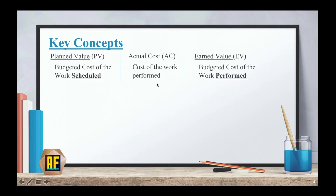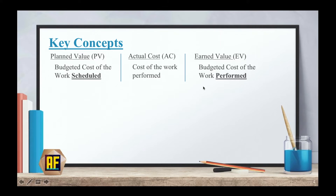And then when you get to the field, the actual cost is what you actually paid for concrete, what you actually paid for excavation. And the earned value — make no mistake here — the earned value is not what you planned minus what it cost. The earned value is the budgeted cost of the work performed, which may include other factors as well, such as money spent on labor, taxes, work that you had to redo, and things like that.